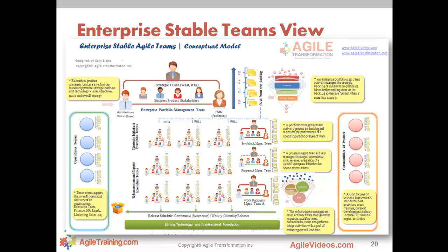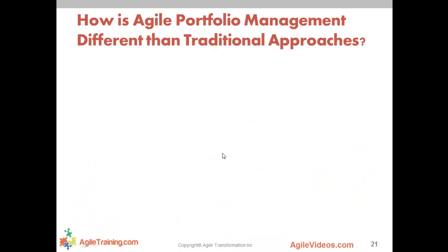So I think the goal, a lot of people take everything to the extreme. Are we looking at 100% focused, dedicated teams? No, but let's at least attempt to move towards some level of stability, some level of lack of resource shifting all the time. And yeah, the more stable these teams are, the more the velocity is going to be consistent, and we'll take a look at some of these measures.